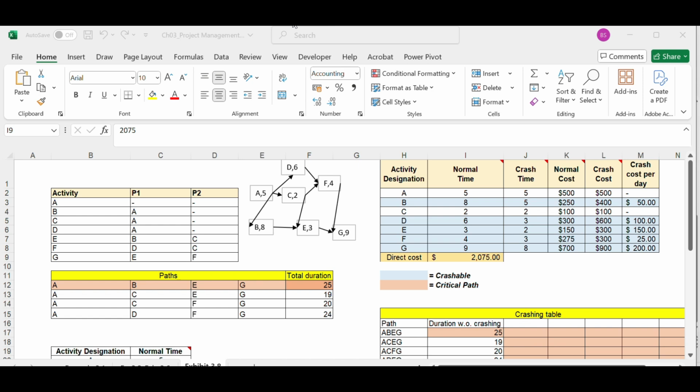Solutions for resourcing challenges include splitting of activities, that is, breaking up big activities into smaller activities. Another is merging of activities, that is, merging smaller activities into a single activity. Maybe reassignment of activities, multitasking, multi-skilling, parallel execution of activities using techniques like start to start, finish to finish, etc. Acquiring or borrowing resources, reducing the scope and extent of the schedule, outsourcing, and informing the sponsor of the overload.